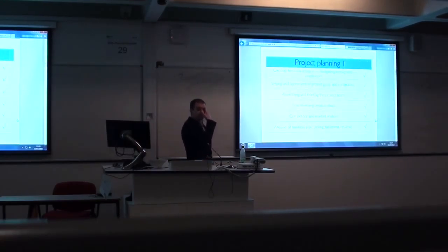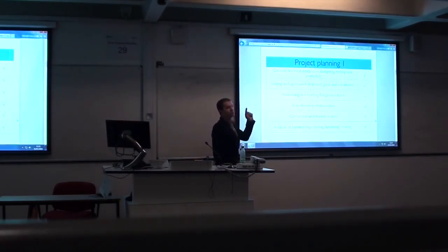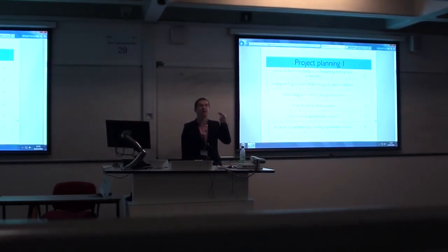So, let's go back to the actual project plan. And what are other bits that you need to be thinking about? Well, first and foremost, you need to keep in mind that there are several parts within the first task when it comes to a redesign of your e-commerce website. Creative, technical, integration, budgeting, testing, and promotion. Now, you have to keep all of those in mind and then break them down individually and make sure that they are part of the plan and responsibility set for everyone to be doing.